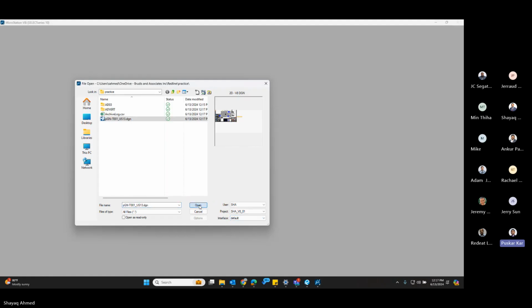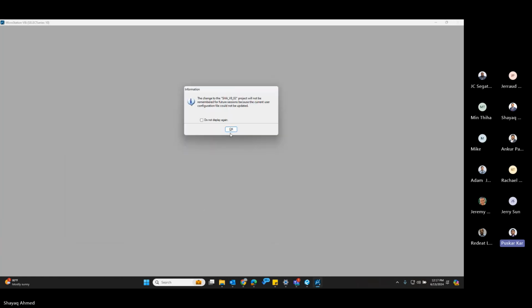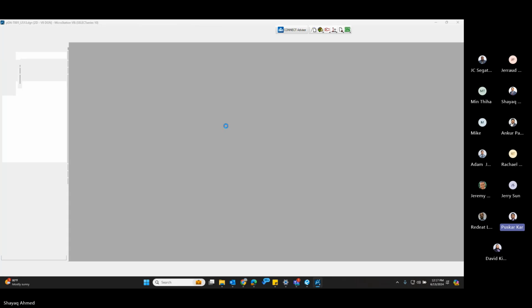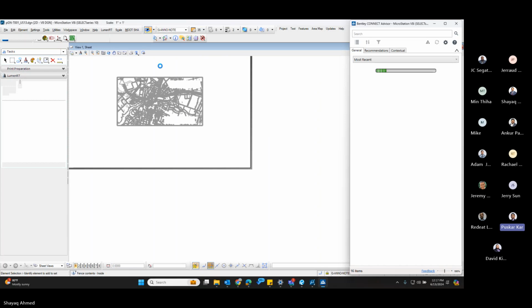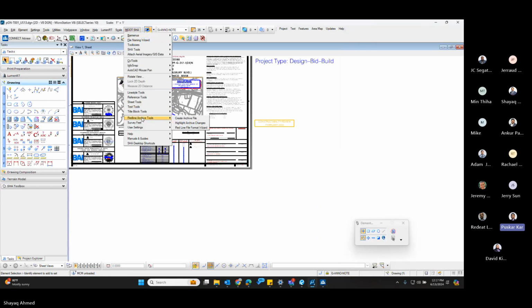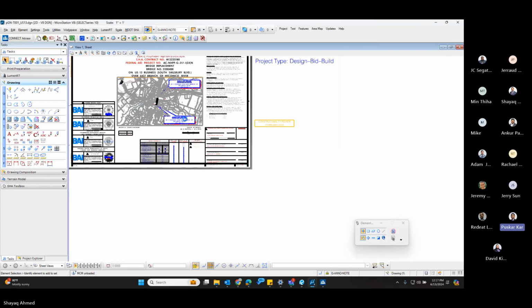So the contractor has the original advertised plan, which they already have in black. But when you issue each addendum and each red line, it will highlight what things have been changed in those plan sheets. That is the purpose. It also locks those levels. Once everything has been merged and the color changed, those levels will be locked from editing, so you cannot draw anything on those levels anymore.